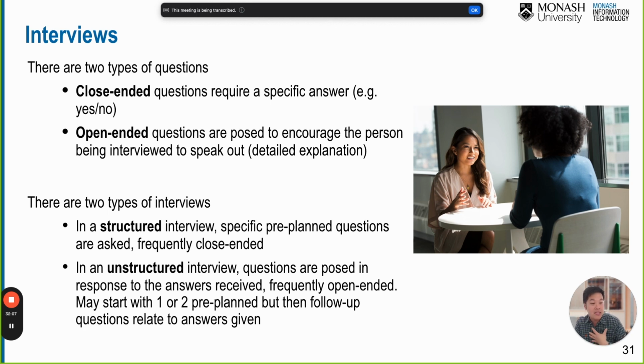Then as a product owner or product manager, you want to prioritize the backlog based on the customer value, right? What is the feature that actually delivers the most value to the customer? For example, the login may not provide as much value compared to a better shopping cart system or a new payment gateway that connects with WeChat or Alipay, for example.